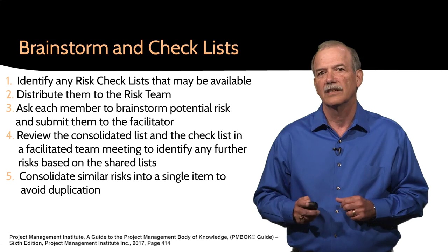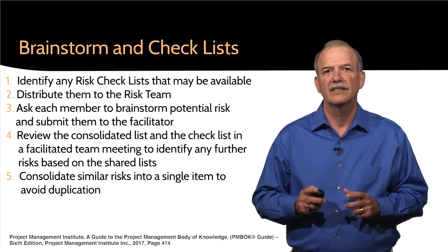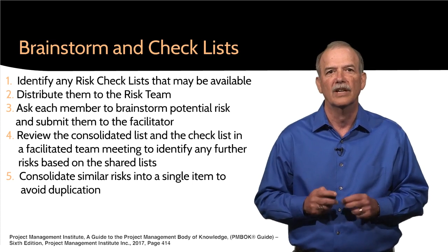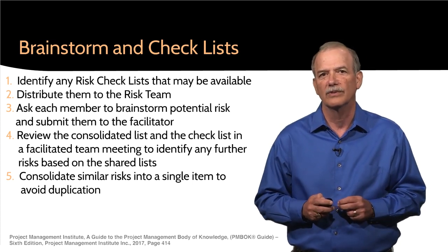At the end of this process, we should review the list and consolidate duplicate or similar items into a single risk description to simplify the process going forward.